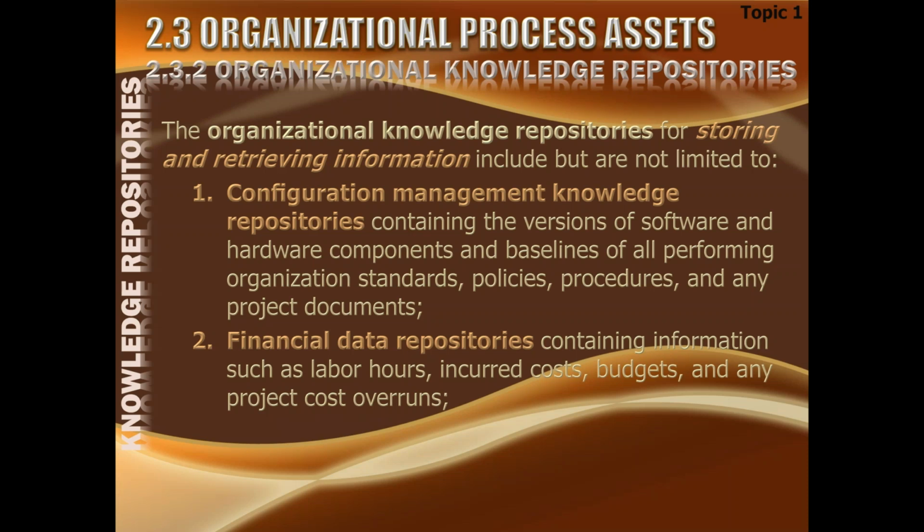When a plan is approved by the boss, it is baseline because now you are not owner of the document. Owner of the document is now your boss. And without his permission, you cannot bring any changes to this document. Therefore, you have to move a change request if it is required to change that document. So not without a permission. And all these changes you are going through, a record must be kept of that. And that is configuration management.